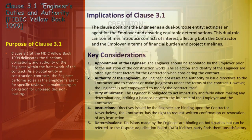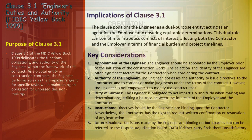Clause 3.1 - Engineer's Duties and Authority, FIDIC Yellow Book 1999. Clause 3.1 is fundamental in defining the engineer's role within the construction contract. As the employer's agent for certain tasks, the engineer must navigate a complex landscape of responsibilities while upholding an impartial stance in decision-making. The dual role of the engineer, acting both as an agent for the employer and an impartial decision-maker, can lead to potential conflicts of interest, influencing project timelines and financial aspects.